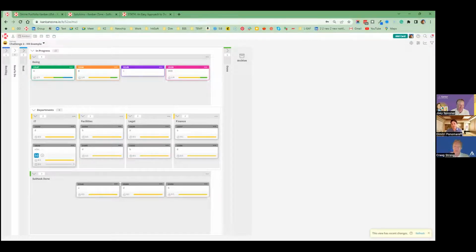And one of the other things that makes possible is story mapping. One of the things as a coach that I kind of miss sometimes is some Kanban tools don't really have the ability to do story mapping. And I think it's a pretty useful tool. I really like that approach to discovery. And you put the epics or large things on the top, and then you sort of work out your... Jeff Patton's story mapping technique.